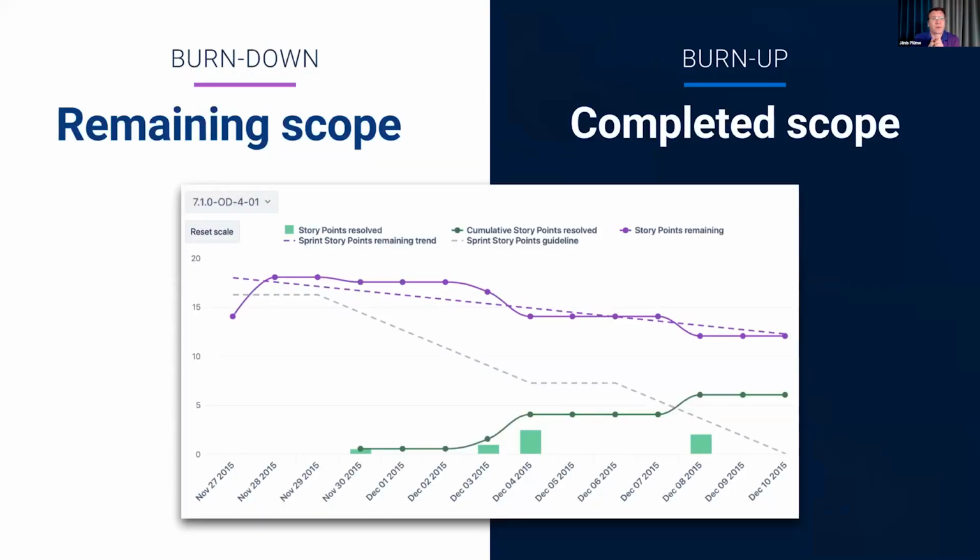But when we try to separate the burndowns and burnups, the most typical burndown measure in eazyBI where the lines should go down is the remaining scope. For instance, the remaining story points measure. That might not be true, that remaining goes down, unfortunately. At some periods it can be growing. The full scope might not be always known before we start our tasks. Estimates might change, usually grow. But the idea is that the burndown line shows the remaining scope, which is declining as we resolve our tasks.